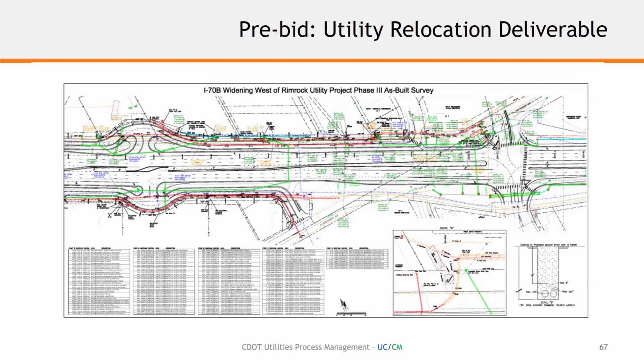So this was, again, that early relocation, but this data was captured and then supplemented for a pre-bid meeting with the contractors that were interested in bidding on this project. And the goal was to show the contractors that we had gone through this early relocation. We had precise horizontal and vertical locations on where the new utilities were at, and that we made every effort to move them either outside the project limit or the construction limits, and